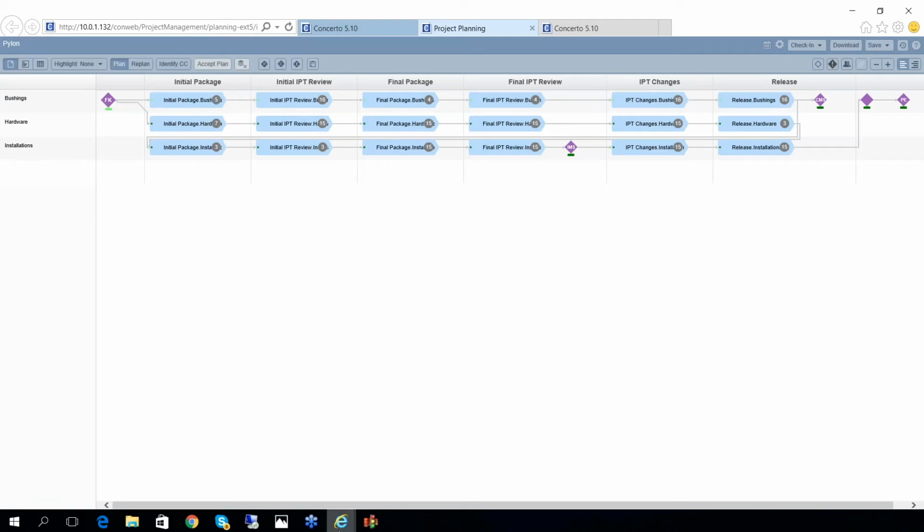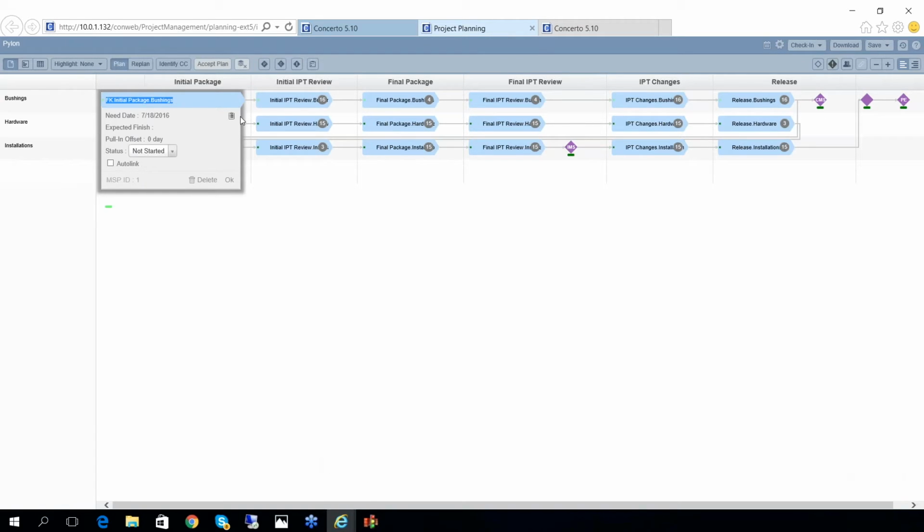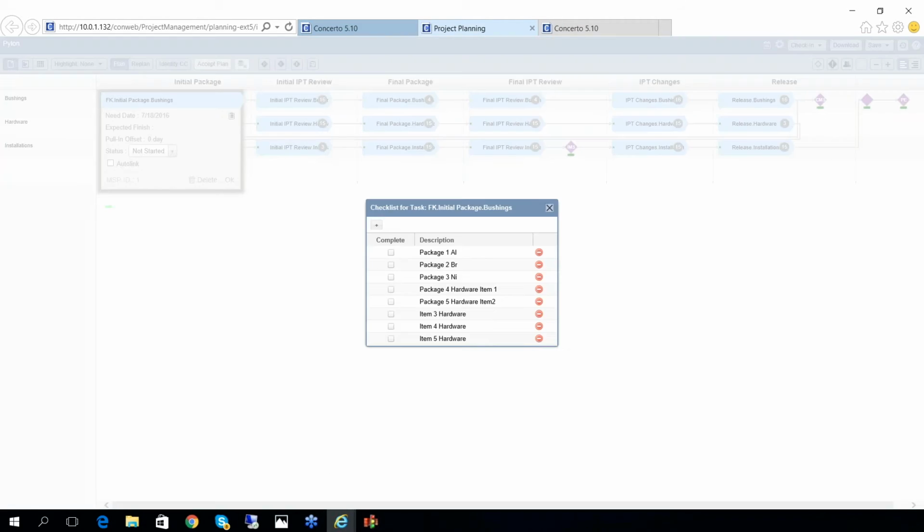Another example I want to show you here is the full kitting. So instead of managing multiple lists, multiple inputs that feed into different points in the project plan, we are aggregating all those inputs into this one full kit point. What we are saying is, don't start the first phase until all these inputs are there, at least from a planning perspective.